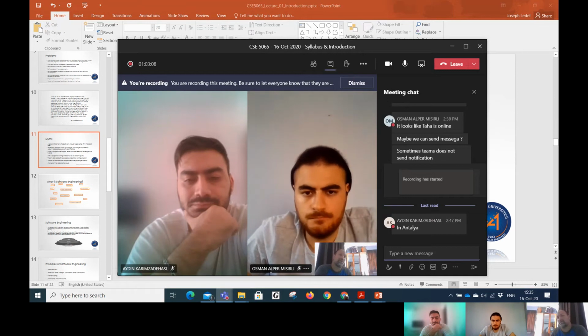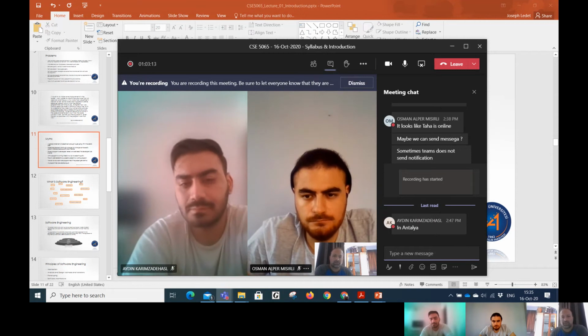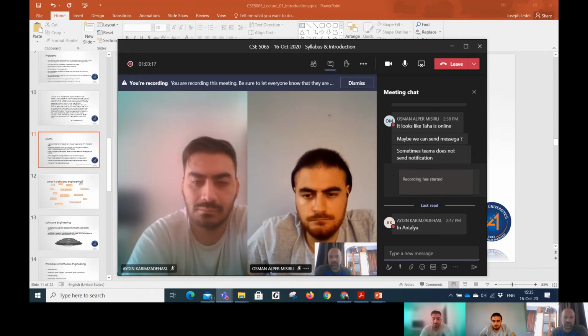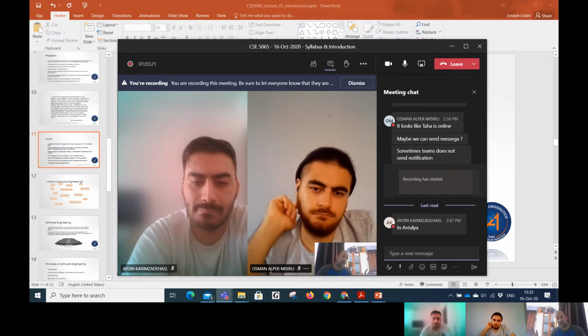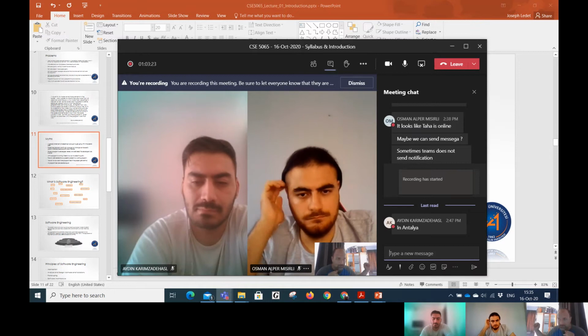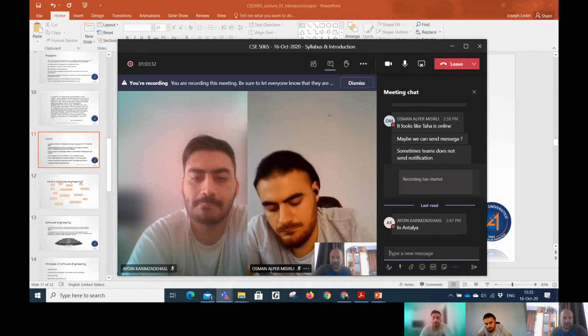One of the things that came out in the news was that they knew about a month prior that the deadline was not going to be reached. What they did to help was hire dozens of new programmers to join the project, thinking if we add more programmers, the project will be done faster.